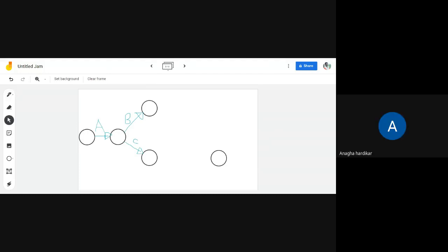So whenever you are drawing the activities, you should not limit yourself to only one activity at a time. You should also check what is the further logic so that there will be less rework. Otherwise, you can complete the network. There is no problem. What will happen at maximum? I will draw one line here, I will draw one line here. Then I will come to know that the next activity is a combination of these two. Then I will erase this and I will bring them together. So if you want to minimize your rework, take into account the next activities also. What is the logic behind them?